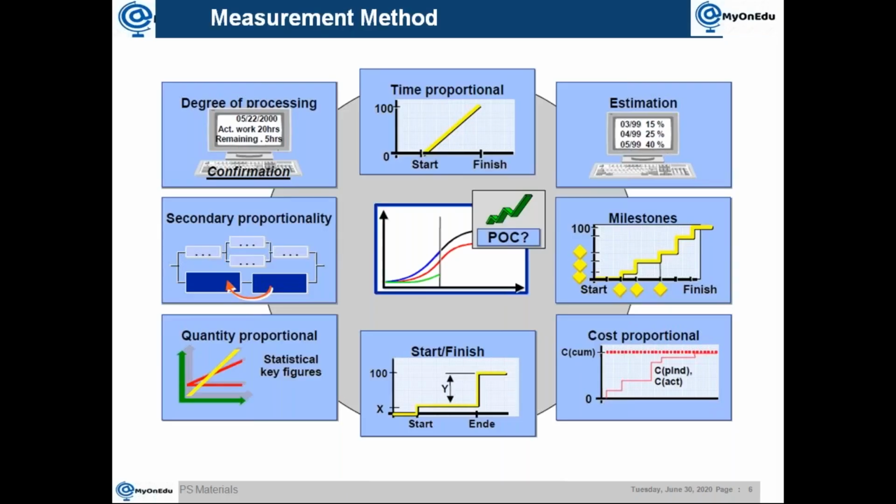So these are some standard deliverables from SAP. You can use them as they are, or you can go for your customized one. Those are no issue. The only thing is you should define what you are going to base your percentage of completion on, because percentage of completion is the key which is used to calculate the planned value and earned value.